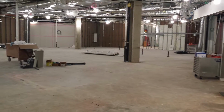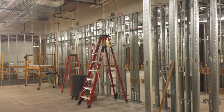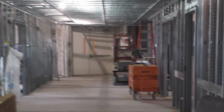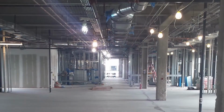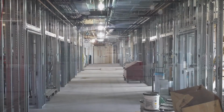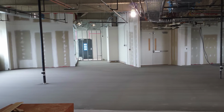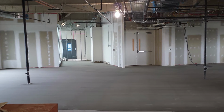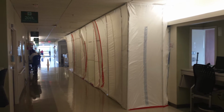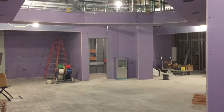The Providence Park Hospital build-out project was really 7 projects in one. The George Auck Company's project management skill and coordination between team players made this project work. The project's components and their scattered locations in the hospital posed major hurdles to success. But Auck's healthcare construction expertise allowed the individual project components to be accomplished in overlapping phases under the supervision of one on-site superintendent and one Auck project manager, with as many as 50 tradesmen working on the site daily.